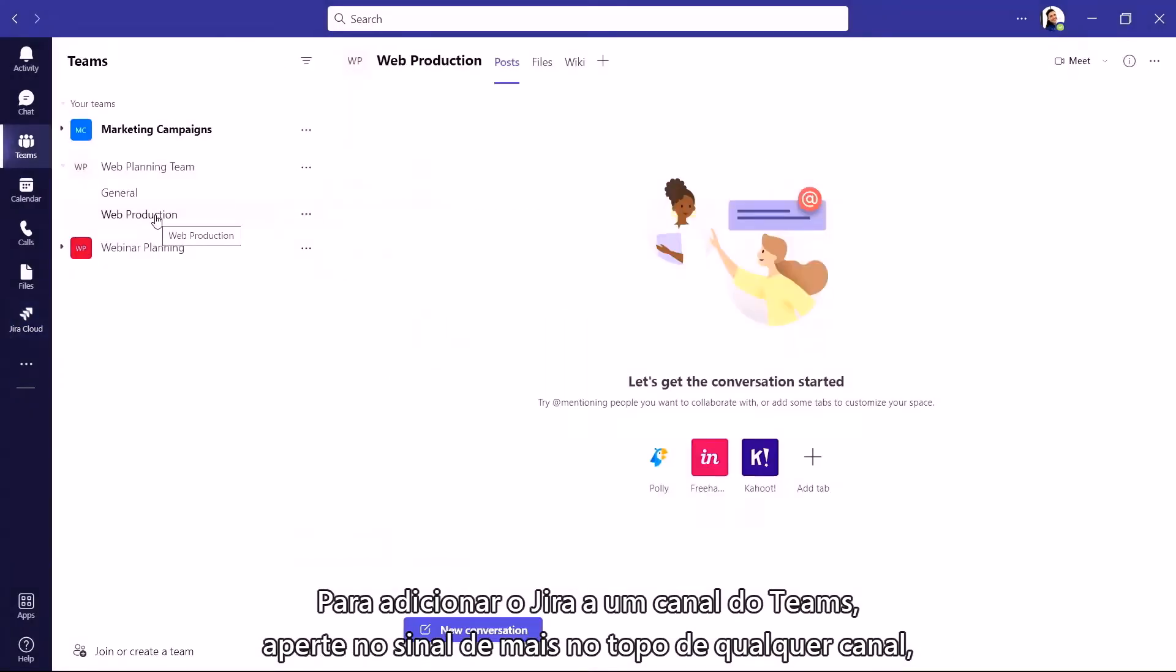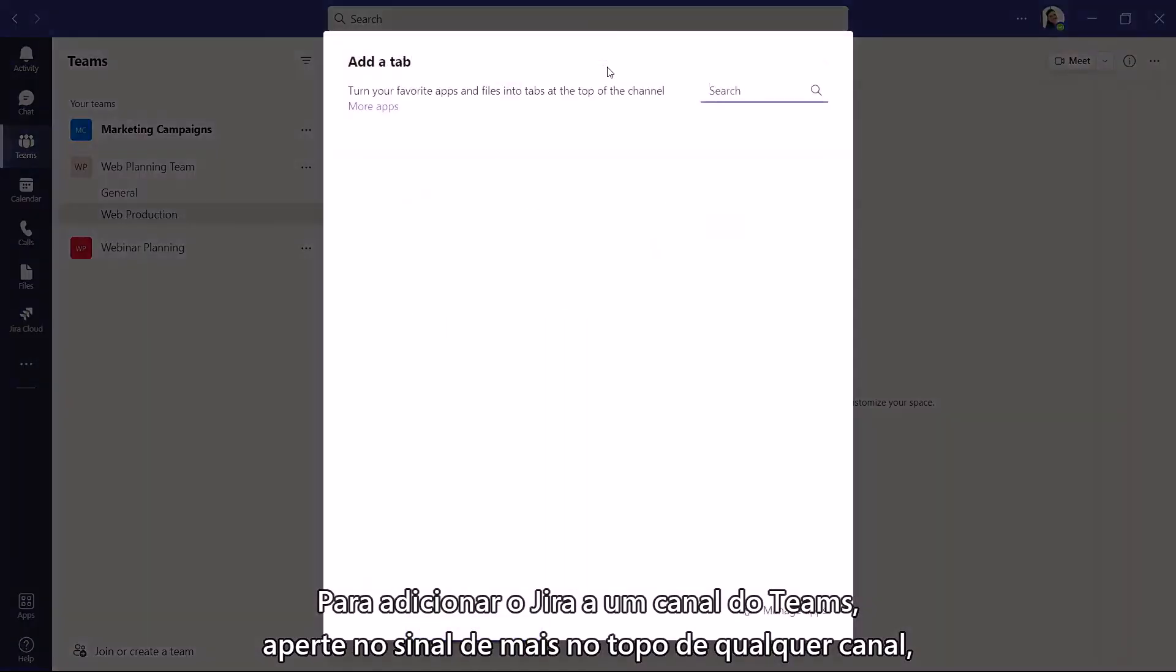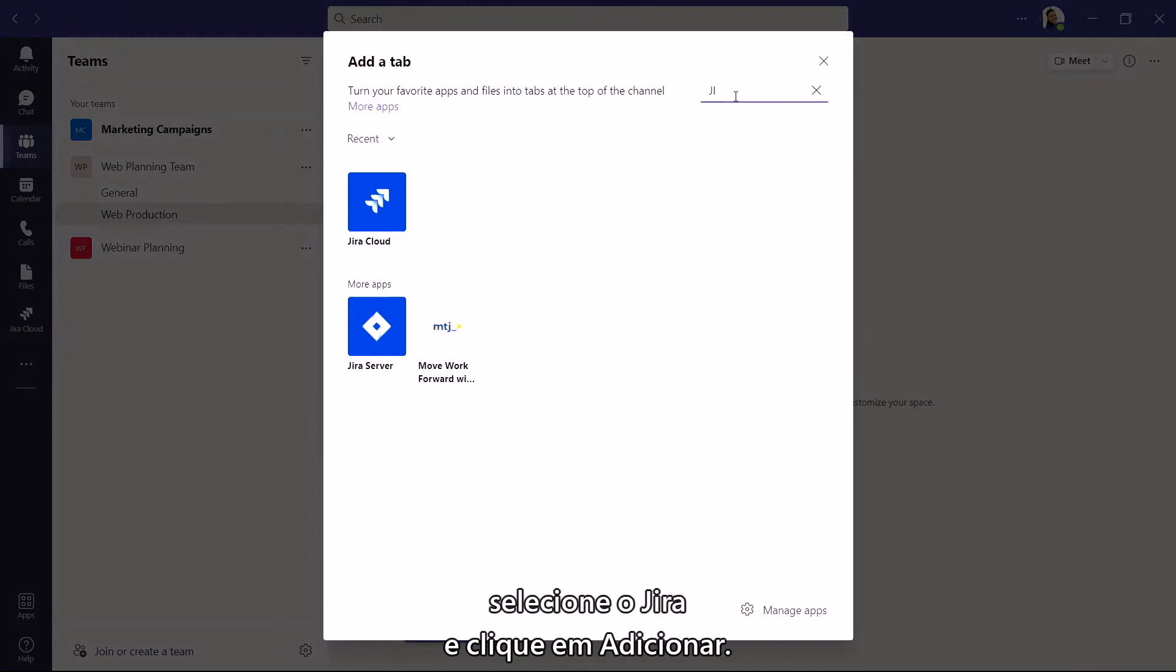To add Jira to an existing Teams channel, go to the plus sign at the top of any channel, select Jira, and then click Add.